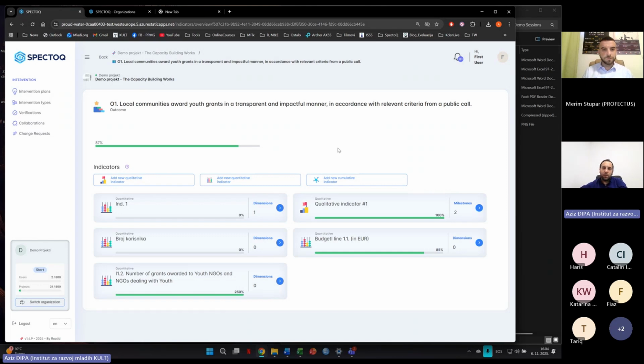Better name of the indicator in this case. So this number of beneficiaries actually could be fed within similar or same named indicators through the different projects or different intervention structures when we are talking about this monitoring process. For example, in 3 different projects, we do have a number of beneficiaries, and we want to see how many beneficiaries we do have on an organizational level, which is actually the sum of these 3 indicators.